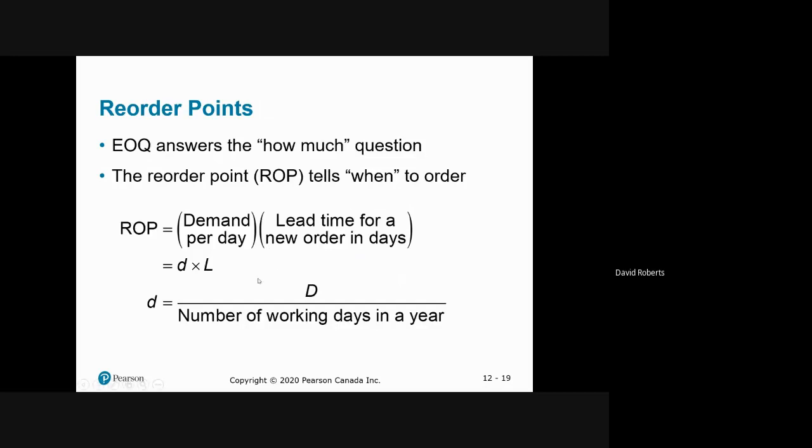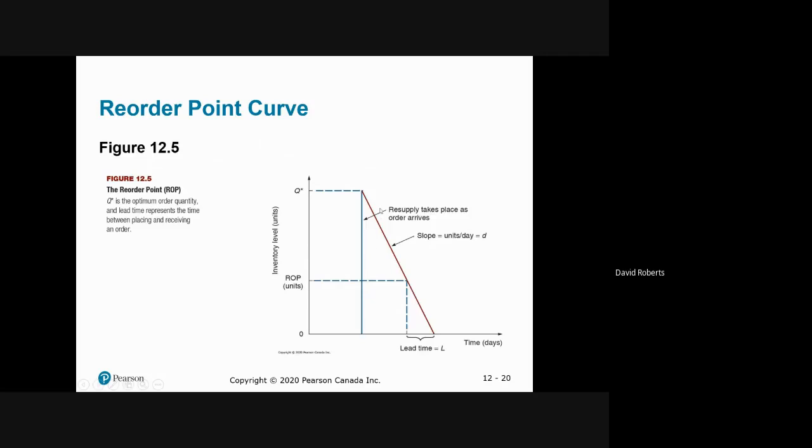Now reorder points has to do with when do you place the order. EOQ has to do with how much do you order, but it doesn't tell you when. So this is how you determine the stock level when you are going to order something. So you take the daily demand, which is little d, and multiply by the lead time. So it's very simple. If you use or consume three units a day, and it takes six days to replenish, you simply take three times six, you get 18. And when you have 18 units left, it's time to order more. But you have to then use EOQ to determine how much do I order. So it just tells you when to order, which is a very important factor.